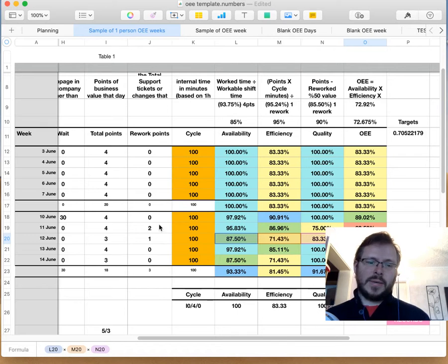So we try and switch that around, and also line it up that maybe 1 or 2 people are doing that, rather than it being sprinkled around to everyone and getting people away from their flow. Because usually change request work is going to be outside the flow of what you want to do. It's going to be work that you've already delivered, and then it's come back, so you're not still working on that piece of work. So that's cool.